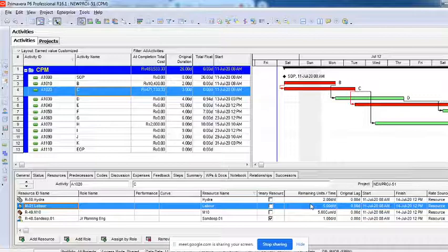I cannot commit, as a planning engineer, saying that I need 5 per day, because the labor contractor will not commit to giving me exactly 5 per day. Then what? The question arises, right? The example here is very simple, so you might not feel that getting 5 people is difficult. Imagine bigger projects, where I'm looking for around 200 laborers on a particular day, and not for one day but for 20 or 25 days, continuously. How do I get them? There's no surety, right? So what you will have to do is called resource analysis.